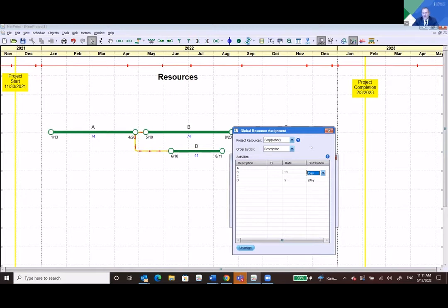One important point often comes up when we're talking about activities. We are a flat distribution here. It's a straight line. We don't have a ramp up capability that some of the other tools have. So this is kind of a big picture way of doing it. If you absolutely need to ramp up, what you can do is take the activity and split it into smaller pieces, and then assign the resources to each of those pieces.